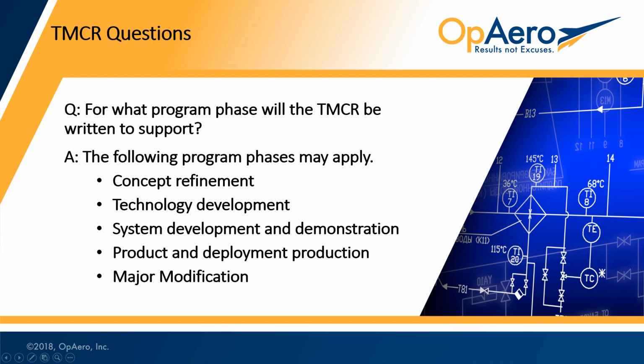Next, for what program phase will the TMCR be written to support? You want to include that in the language, whether it's concept refinement, technology development, system development and demonstration, product and deployment, production, and or major modification.